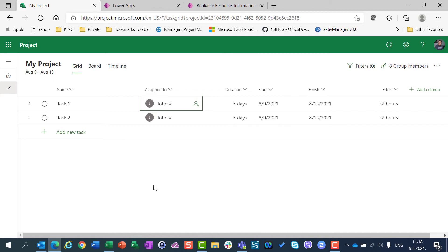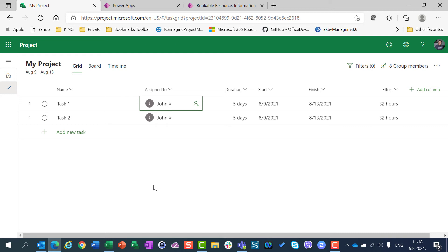If you don't do that, then in that case, you will have to de-assign John and assign him again. And that is what you have to take care of. And it can be very complicated and frustrating if you, for example, have five projects with 500 tasks and John is supposed to work on, let's say, 100 tasks at the same time, which is not possible. But you should be careful if you, for example, put afterwards day off because in that case, you will have to de-assign him and assign him. That is the first thing that I want to show you.